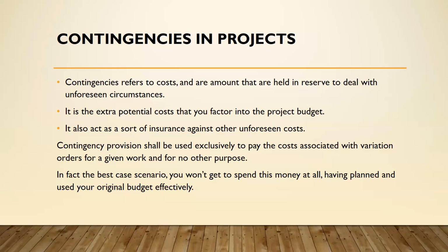Now, contingency provision shall be used exclusively to pay the cost associated with variation orders for a given work and not for any other purpose. In fact, in the best case scenario, you won't get to spend this money at all, having planned and used your original budget effectively.